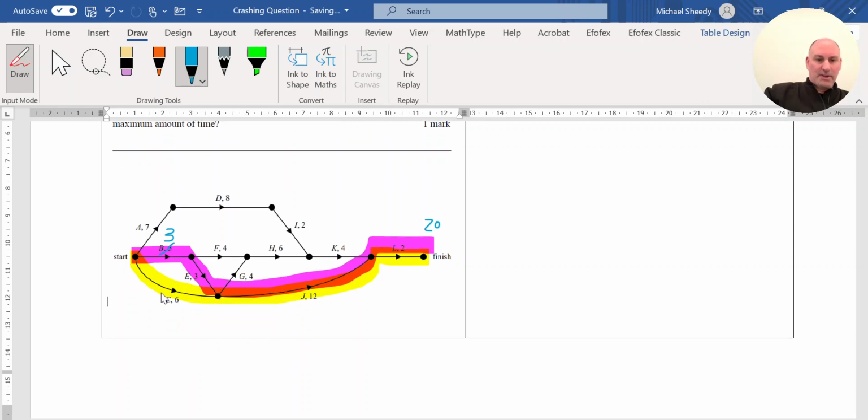So notice traveling along the yellow line to get to this vertex would be 6. But when I travel along the pink line, it was originally 8, 5 plus 3. And as we move forward, we should always take the highest number. So we will take the 8. However, if I take the 8 and move forward, I end up with 22 as an overall completion time, not 20.